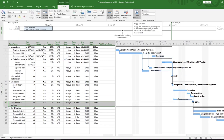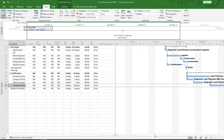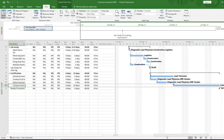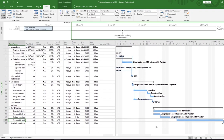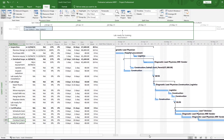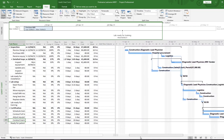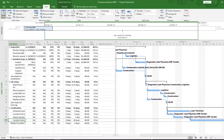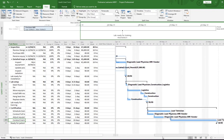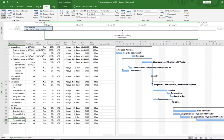Another useful thing about the timeline: if you drag the scrollbar along the bottom of the Gantt chart, the timeline highlights which phase of the project you're currently viewing on the Gantt chart. This helps navigate a large project where all tasks don't fit in one screen.